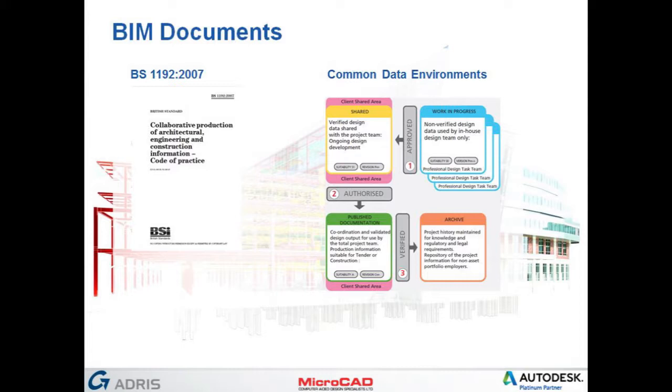This is really starting to talk about production of information by different design teams. So whether it was an architect, structural engineer, and a MEP consultant, for example, each of those will be producing a work in progress set of documents. Those would then be shared to a shared environment, a common data environment. And then at some point there would be an authorization, a kind of tick off of that and say, yeah, that information is good. In essence, we used to call them statuses. So obviously that status would then get changed to being approved, as it were.